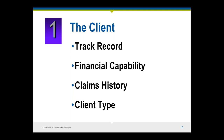Is it a committee — for example, a church group or a husband and wife team? When you have a committee, your risk goes up because you have a number of different people who may have differing opinions of what they want. It's most important to have one person elected as the decision maker and communicator with you, so you're not getting different input from many different parties. Document every decision that's made and who ordered you to make that decision, because all of that might come back to help you should a claim arise. Another problem with committees is that people come and go — you start with one group but by the time the project is underway, you might have different people who don't know the history.